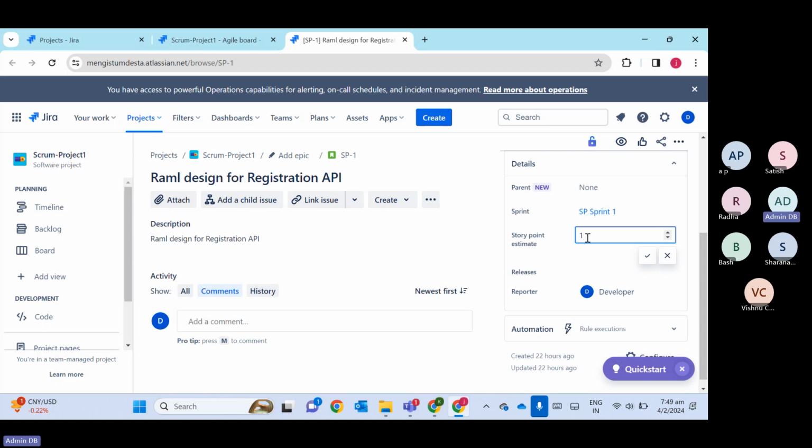So the same task is there, the same complexity is there, but based on the person who is developing this, they take a different number of man-days. So you cannot give man-days for any task. We should give complexity. For the same complexity, you might take one man-day, three man-days, five man-days. Correct. So that is story point. And for story points we follow the Fibonacci series. So that is 1, 3, 5, 8, 13 like that.